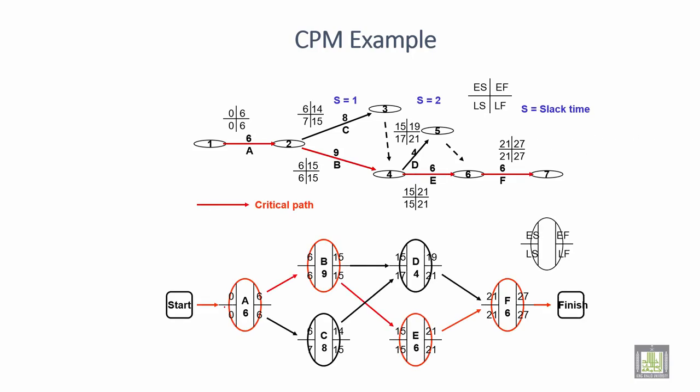First here, it starts from 0. The path is 6. Then this 6 is put over here. Then you have 8, so 6 plus 8 is 14. But they have slack time, slack time of 1. What we have to do is see that slack time because we have two options here. First is 14. Again, start with 0, 6. Put the 6 here, and we have 9 here. So 6 plus 9 is 15.